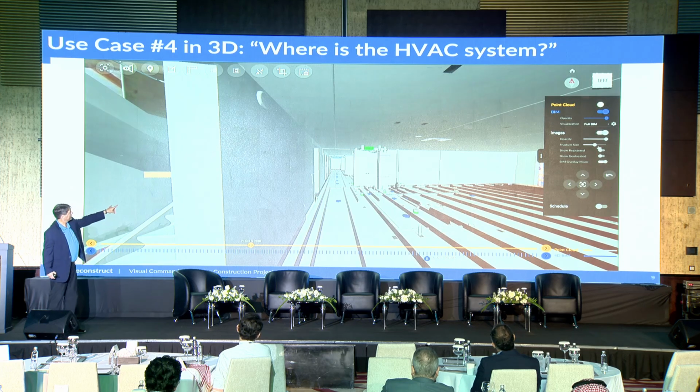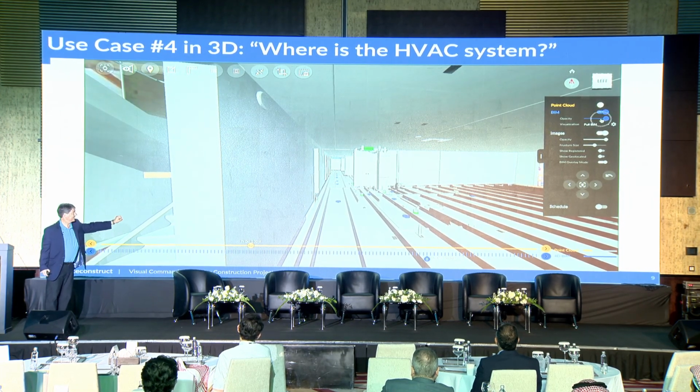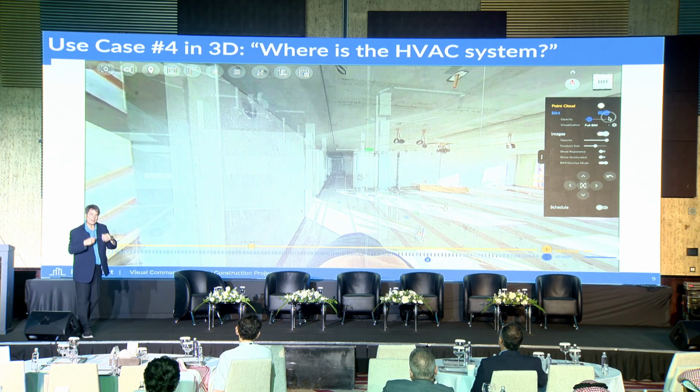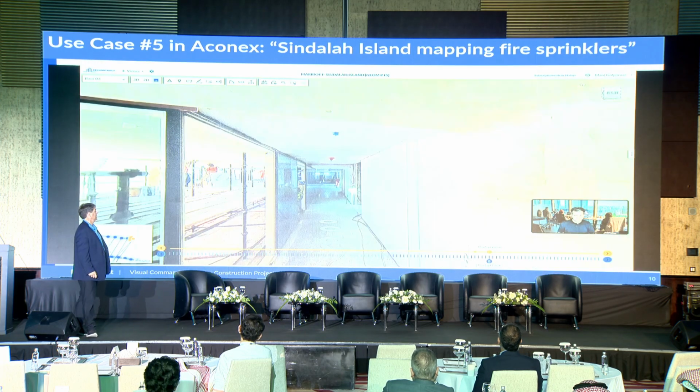And I'm going to show you guys, see the green section? That's what the BIM model says is supposed to be there at that time. But notice very quickly, it's not there. So there's a progress monitoring element to this as well. I thought we were just going to measure for quality. Turned out it's not there, so I'm measuring a bit of progress as well.